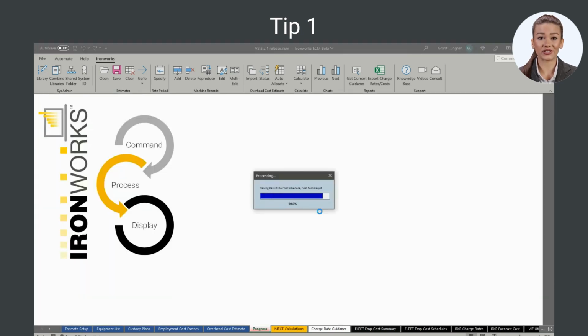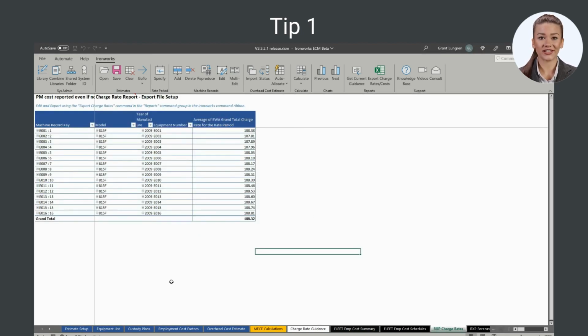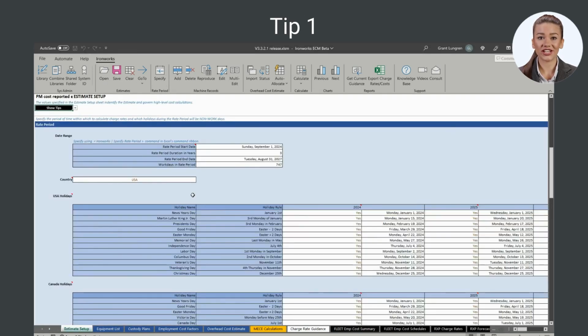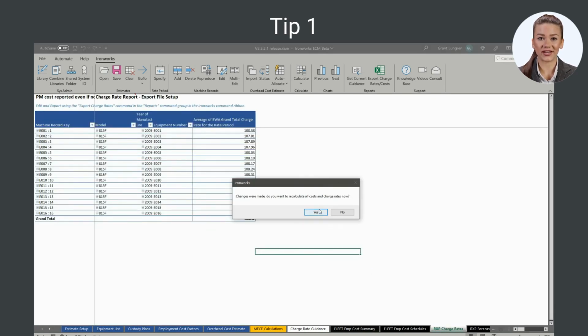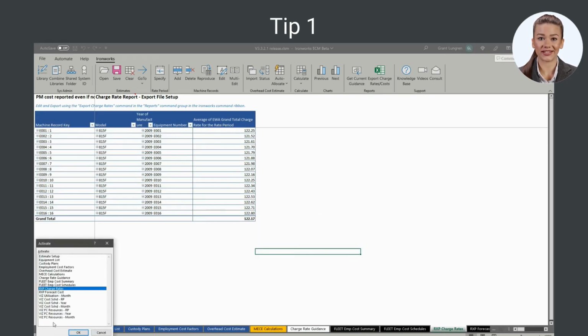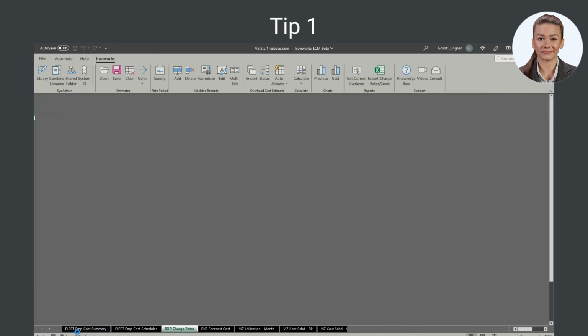Set the rate period duration as 2 or 3 years for developing charge rates for long-term jobs, or for developing client-specific charge rates good for more than 1 year. 3-year-long rate periods are best for planning long-term changes in your company. For example, if you plan to ramp up construction revenue for the next 3 years, a 3-year-long rate period enables you to forecast the number of additional maintenance staff needed each year.